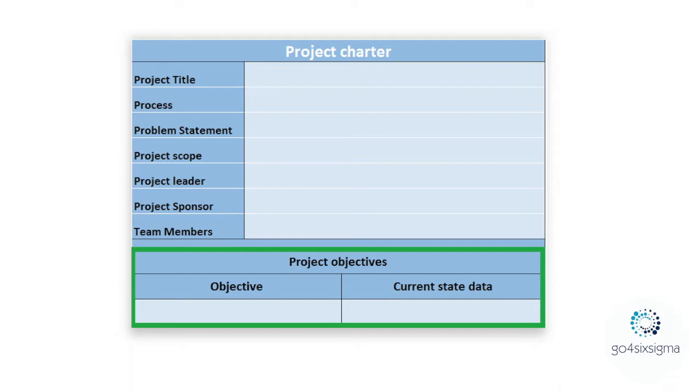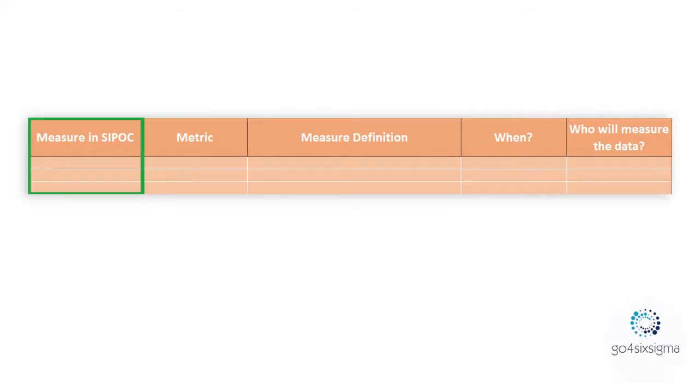Let's start with the first document: the data collection plan. Look at your project charter, specifically your objective section. Determine what current state data needs to be collected. In the first column, be very specific about whether your objective is related to the input, the process, or the output.